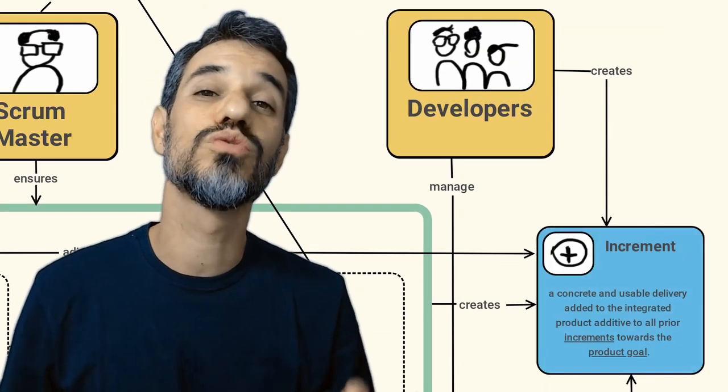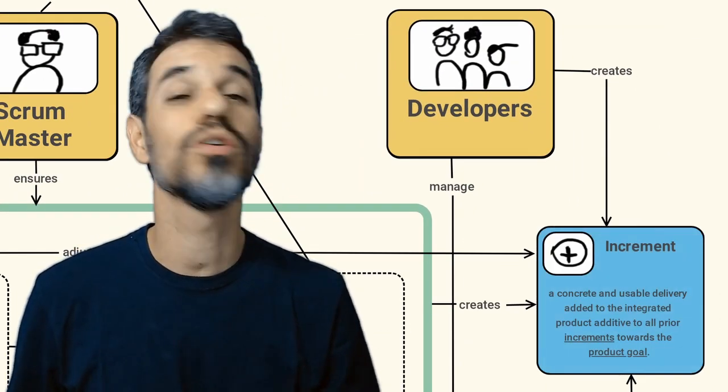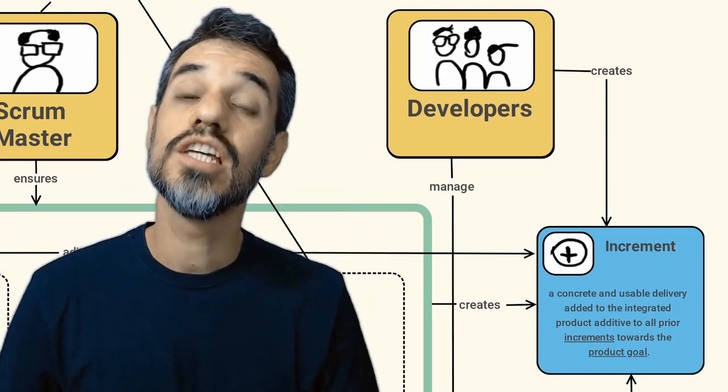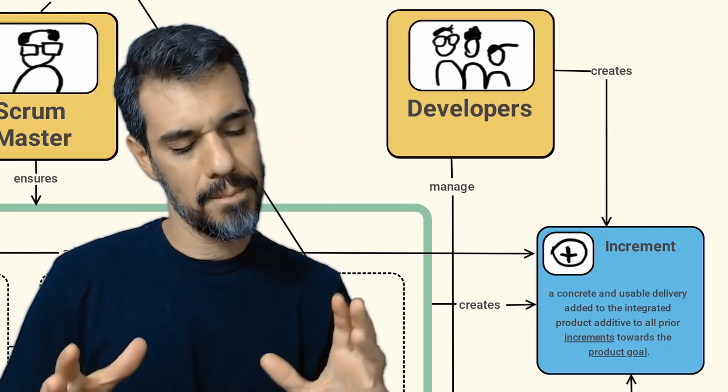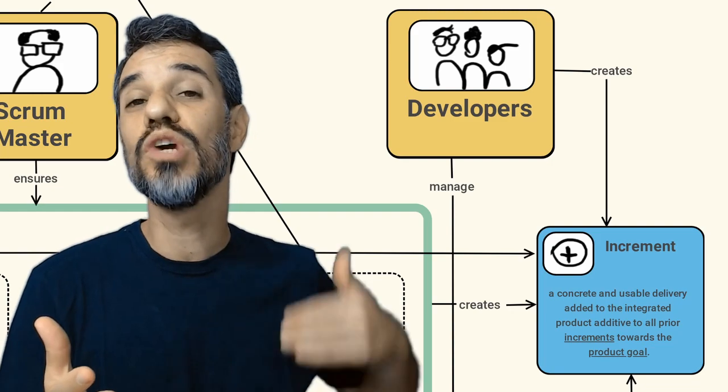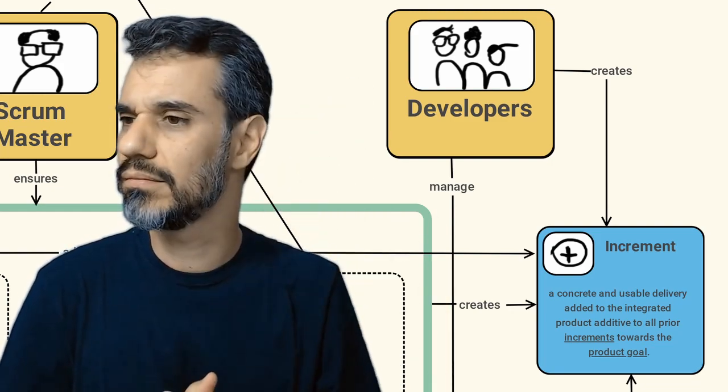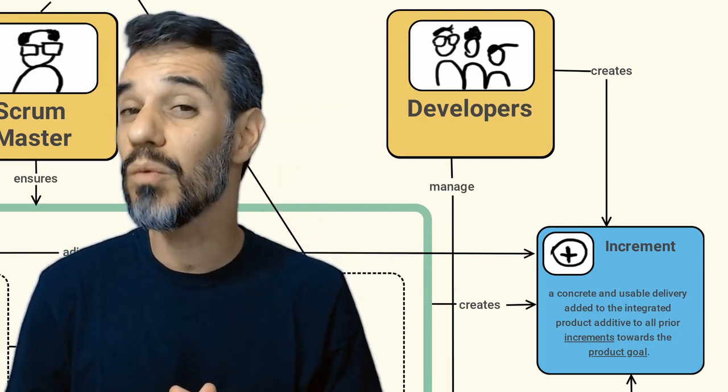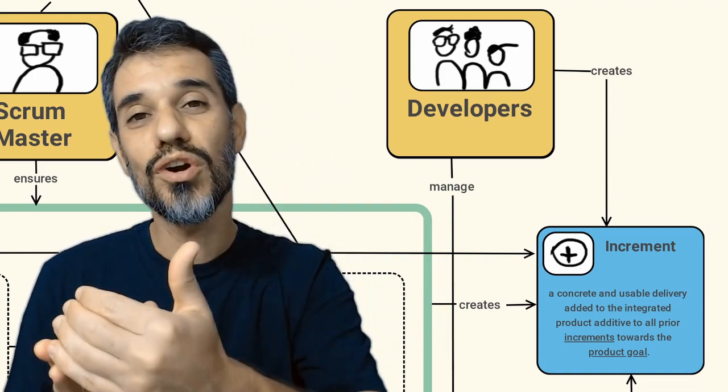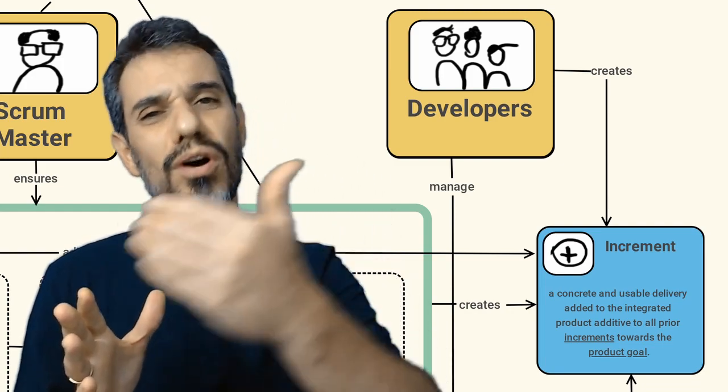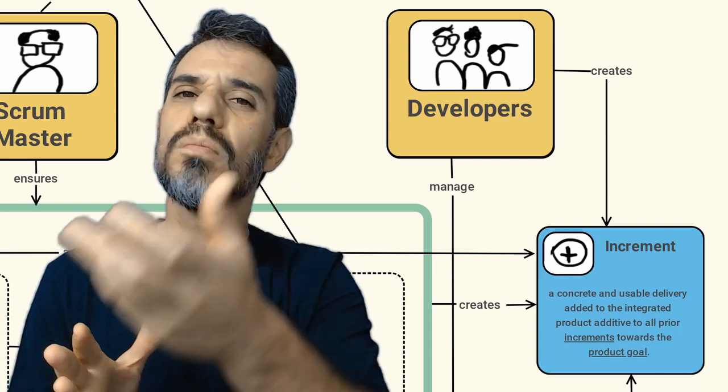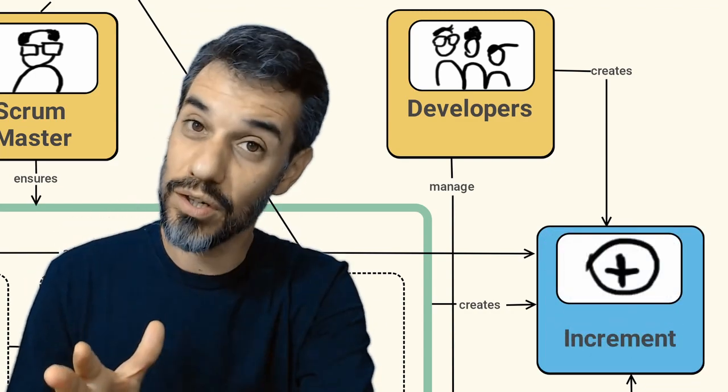And those developers are those responsible to create what we call the increment, the last artifact of Scrum. An increment is part of the product, a part that you are going to add to the working product in every sprint. Did I mention that the sprint starts whenever the last sprint ended? So for every sprint you are going to increment your product with some new capacities, with new usable functions of that product.